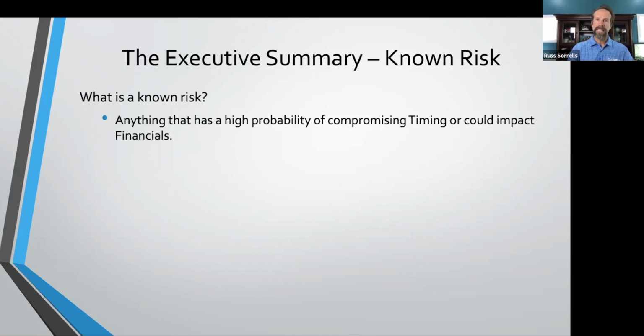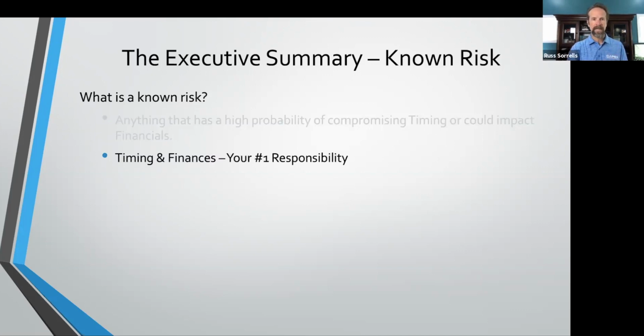And then on the financial side, if you have a financial justification that's based on a specific dollar amount and you exceed that dollar amount, now the justification that you've used to get approval for this project is no longer valid. So it's important that you keep an eye on those two things: timing, financials, timing, financials. So again, your number one responsibility, I'll keep talking about that every day, day in, day out, is from a project management perspective, very, very important.